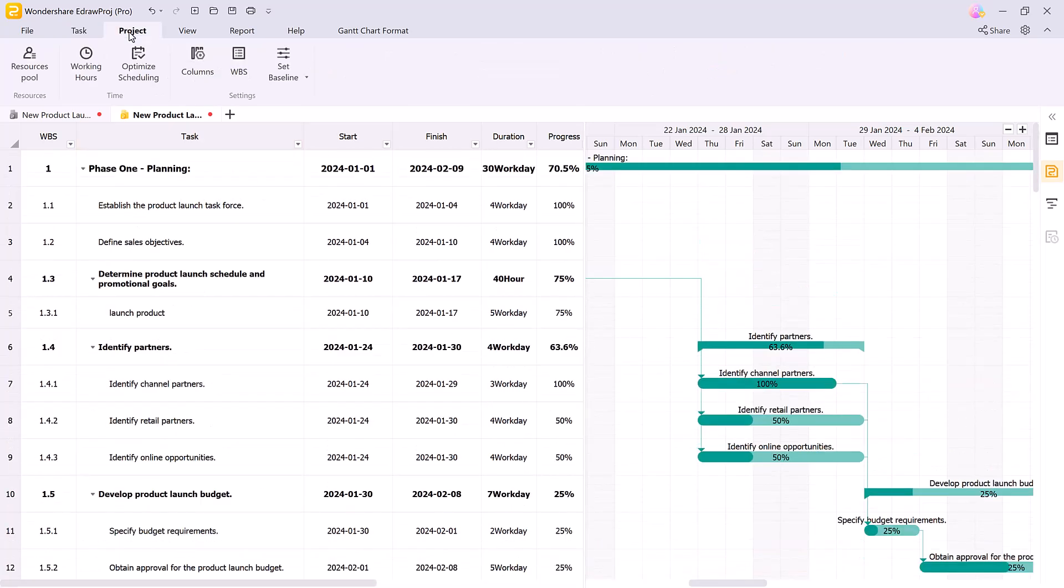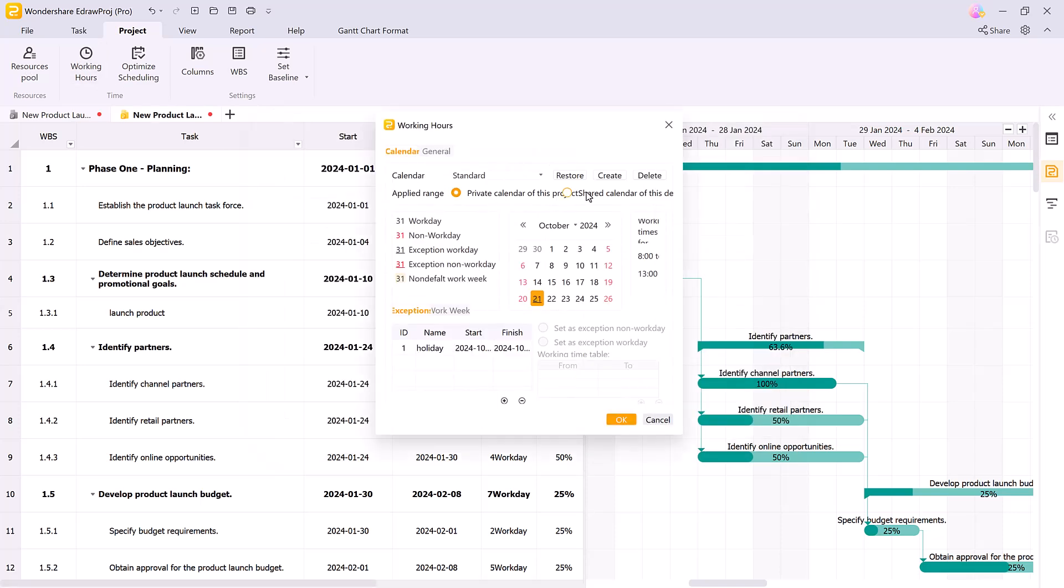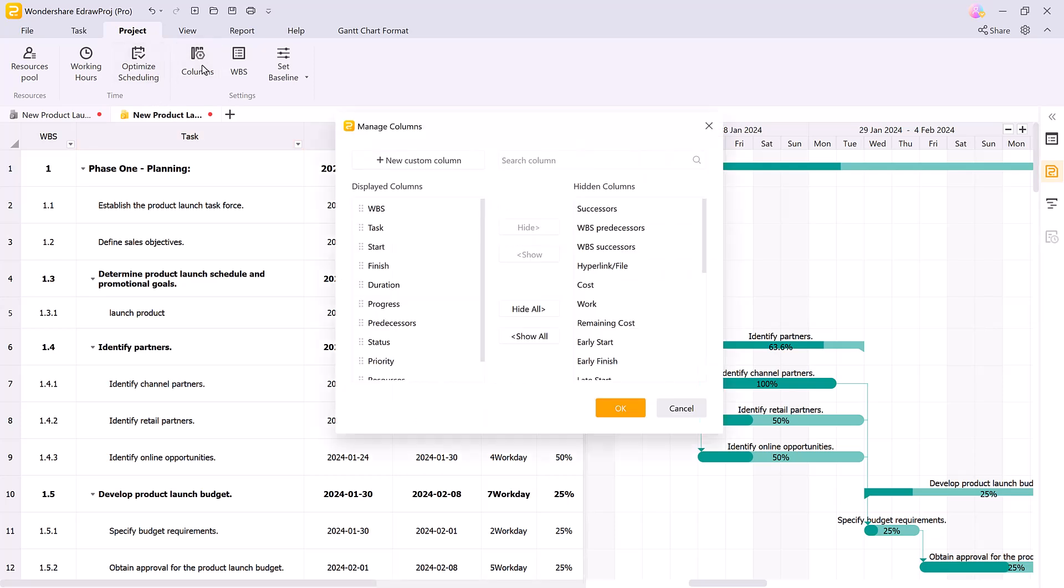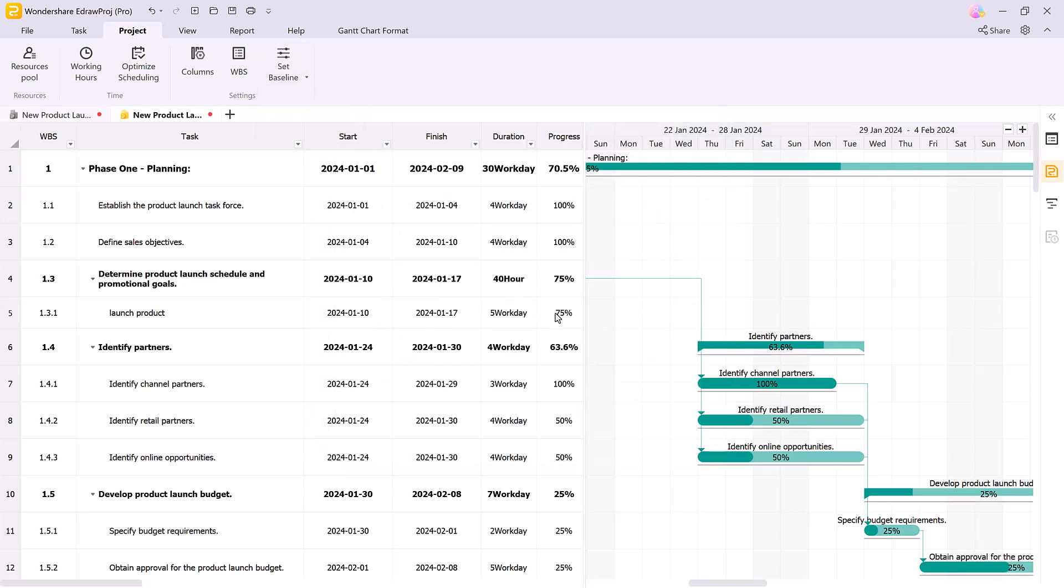In the project tab, you can dive into resource allocation, adjust working hours, optimize scheduling, and manage project columns. You can also set baselines which help track progress against your original project plan.